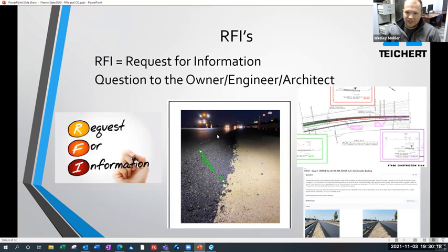If you were to be driving at 60 miles per hour and you had to pull off onto the shoulder, right? That's basically 8 inches of drop off. That would really screw up your car, especially if you were riding low, you weren't in a pickup or something. So needless to say, this is not Caltrans spec. It's a safety hazard. So we had to turn in this RFI before we could put traffic on this portion of the freeway.